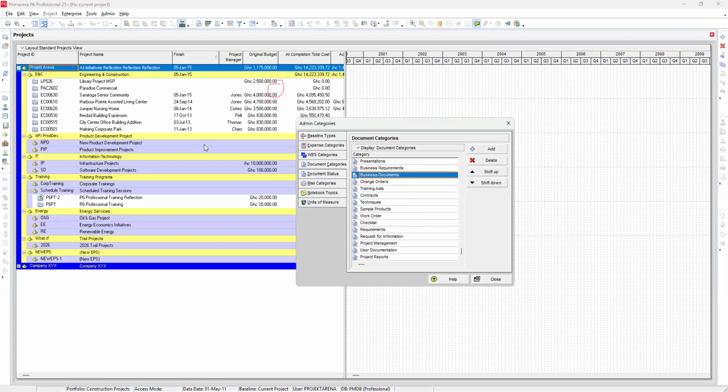And these documents will be in the form of contracts. Maybe there's a contract variation, so there are change orders. It's been issued, so a particular activity being undertaken will have to be changed. And you have to ensure that those details are mentioned or attached to that particular activity. We will look at that. And you need to attach these documents to that activity.